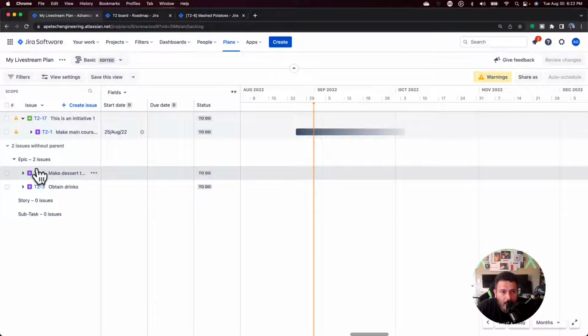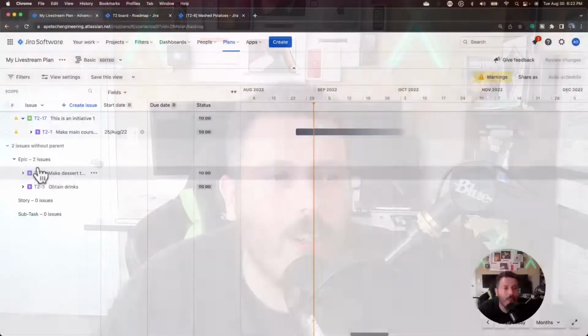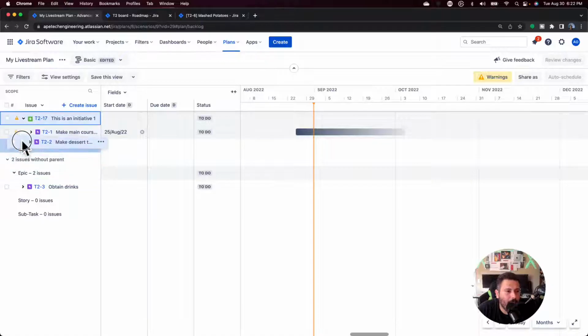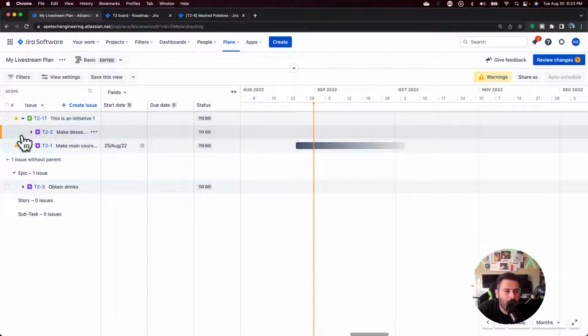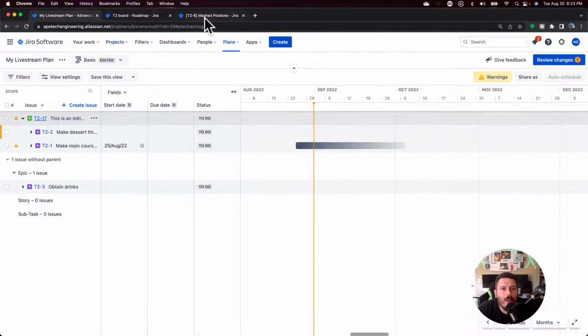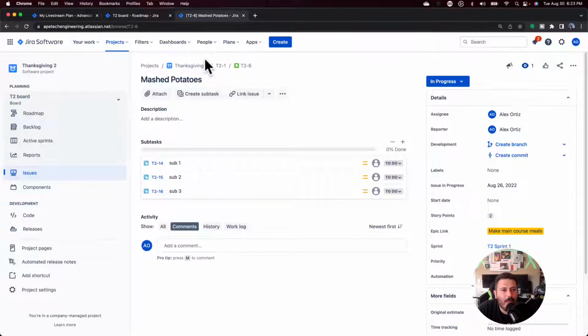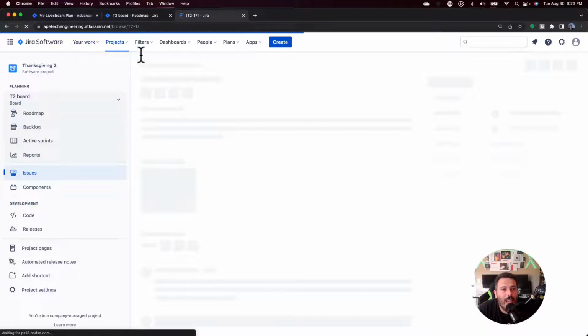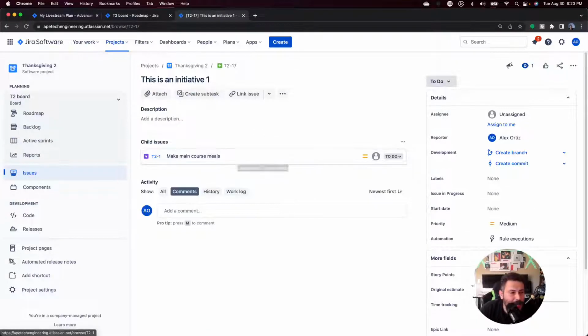This can be okay, or if you want to relate them, you have 2 options. You can either go and add the parent link like I did earlier, or, y'all sitting down, you ready to have your mind blown? You can just go and grab your epic, grab it about right here, drag it, and then you can just drop it in there. And now, when I open up my initiative, let me go back all the way up. I can hit refresh, and you'll notice that it's not there.